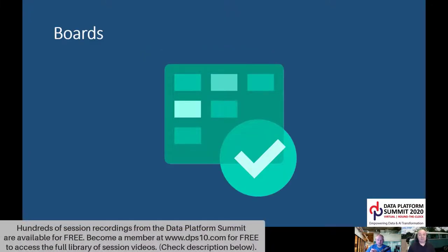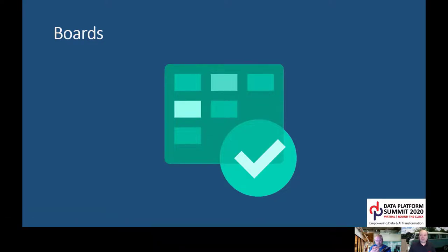So anyway, now I've gone through that, Sander, we better discuss Azure Boards, since I'm going to be using it to organize our backlog items. Now, Azure Boards can use basic, agile, Scrum, or CMMI templates for each project you create in Azure DevOps. As I mentioned earlier, towards the start of this session, these templates are actually called a process within Azure DevOps. Because we're using Scrum, Sander, we'll probably want to use the Scrum process. For now, we can keep that process as standard, but we can customize the various processes if we want to by doing things like adding extra columns.